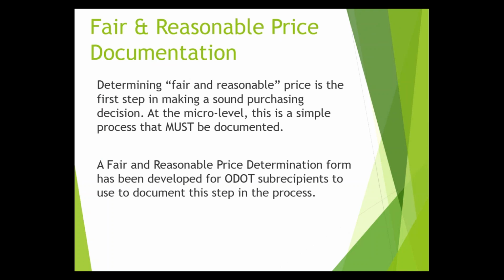Determining fair and reasonable price is the first step in making a sound purchase decision. At the micro level, it's a simple process, but it must be documented. A lot of times people will say, well, you looked it up online, or it's a computer in the IT department, they know what a fair and reasonable price is. That's fine to me. But in the world of procurement compliance reviews, if it isn't written down, it did not happen. That needs to be documented.